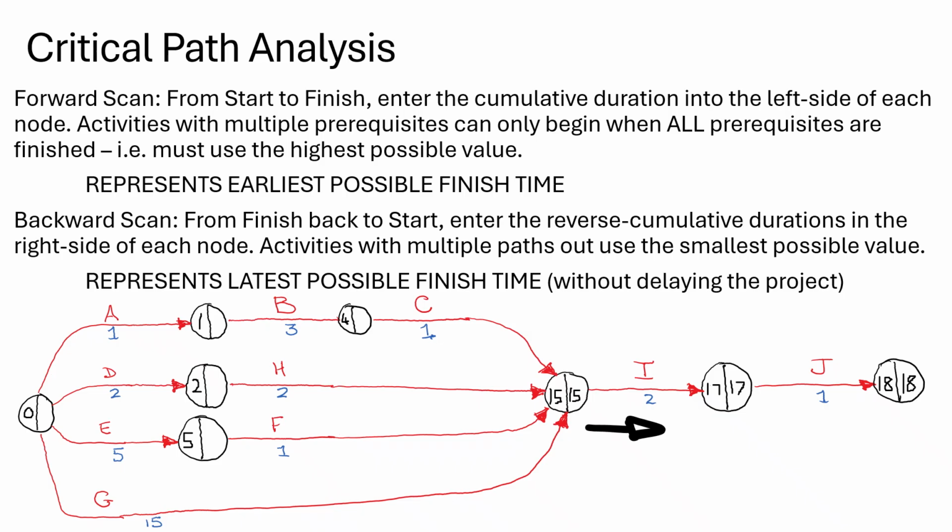So if we do 15, subtract the 1 along C here, we get 14. And then when we do 14, take 3, we get 11, obviously. And then when we do 11, take 1, we would get 10. But again, this is a scenario where we have multiple things heading into this final vertex on the left from a backwards direction. So we can't put that 10 there. We have to consider all the paths. So let's keep doing that.